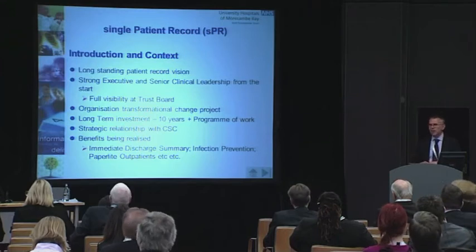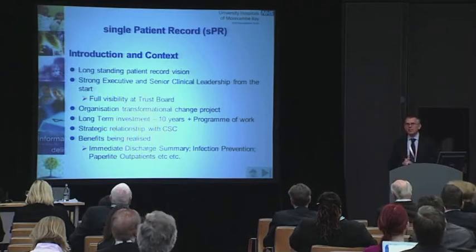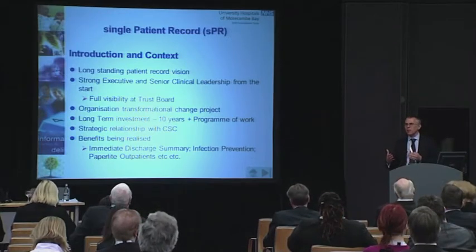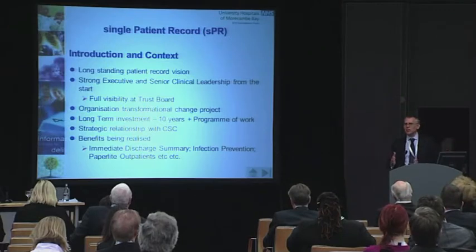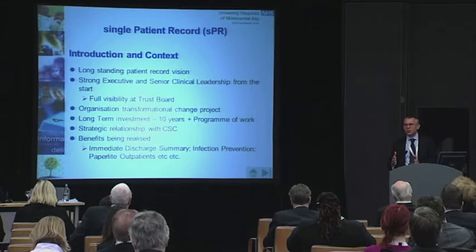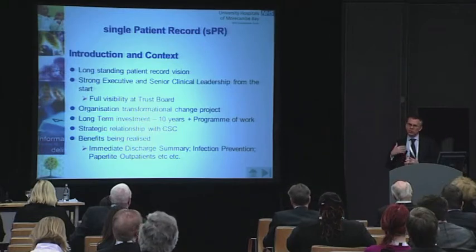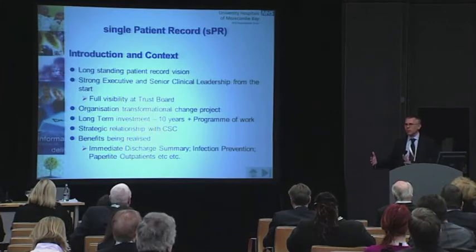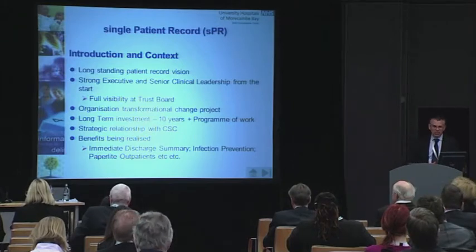The product initially had a number of issues, predominantly, and this is just my perspective, that when it was first undertaken by Connected for Health, it was like, let's design a product for outpatients, and we get 100 people from across the country in a committee trying to design the product, which was, from our point of view, a fundamental error, because we've got a camel, or the initial drafts of the specifications were camels, not what fit for purpose and what we needed. And so the fact that we are now linked closer to CSC and do that development work with CSC means that you've got real frontline people pushing forward that product. And that's made a massive difference.